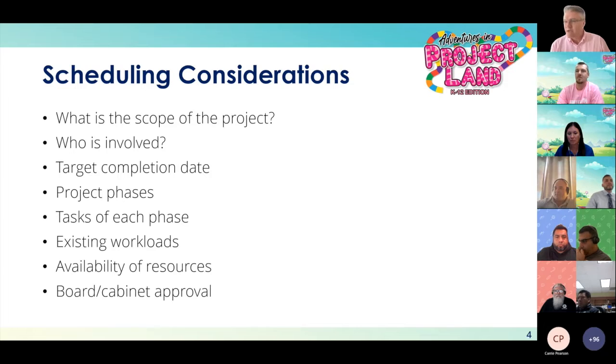For example, you might want to have a planning and discovery phase where you're really talking about what all needs to be included in the project. Then move into a design and build phase where you're building out the solution for your project. Testing is a big one, especially if it's something related to data. Obviously, you'll want adequate time to test everything before going live. And then the implementation phase. This is probably where you'll spend the bulk of your time during a project.